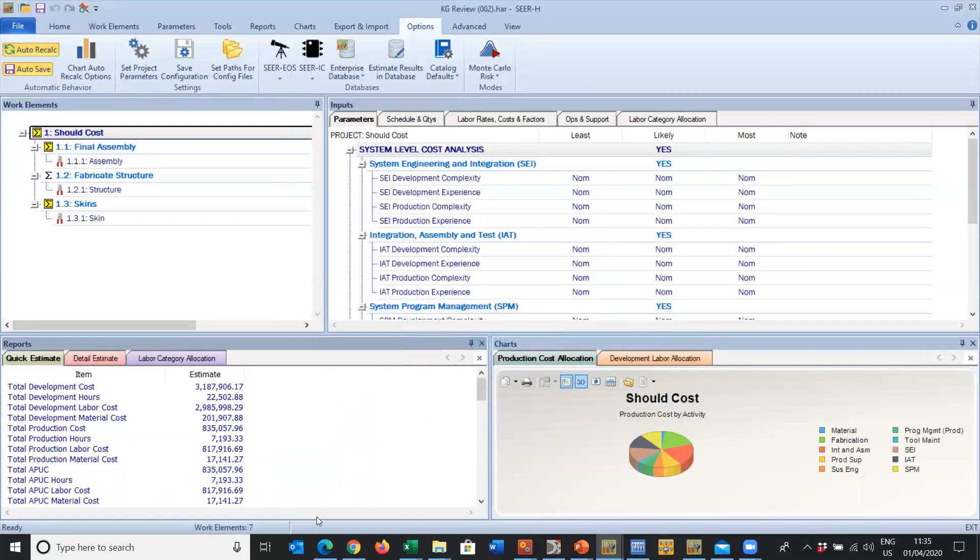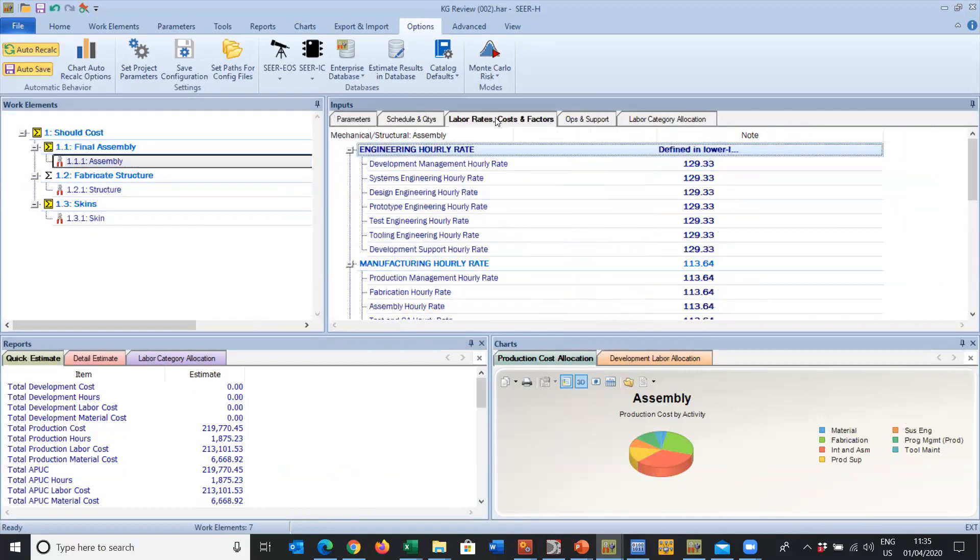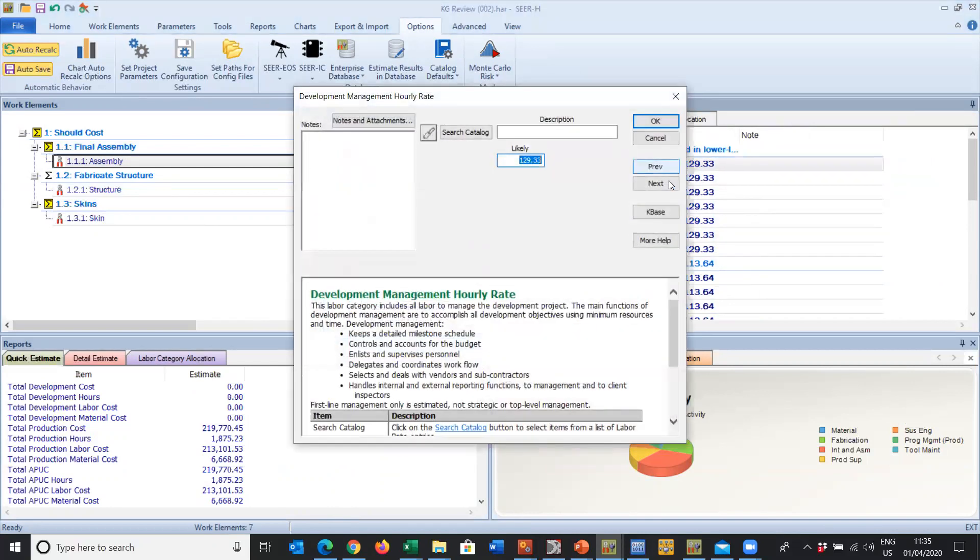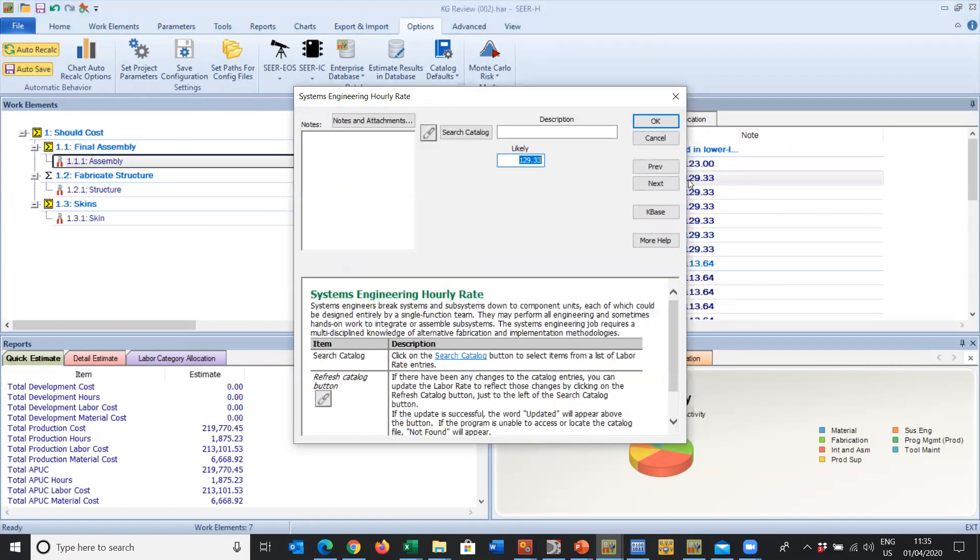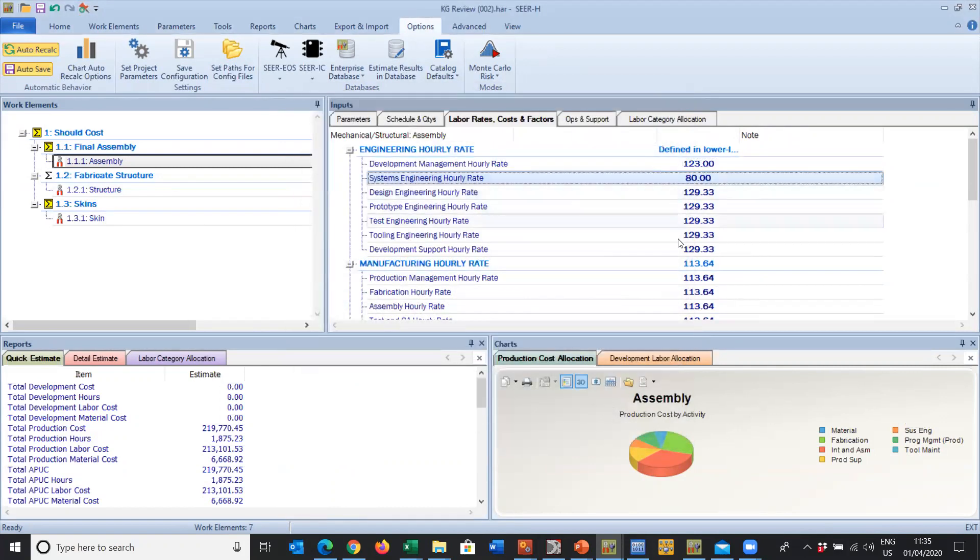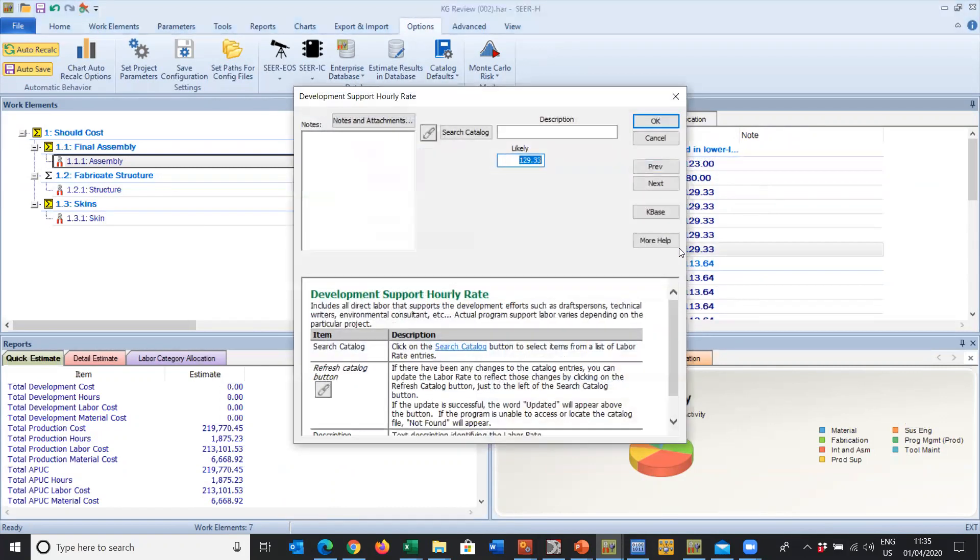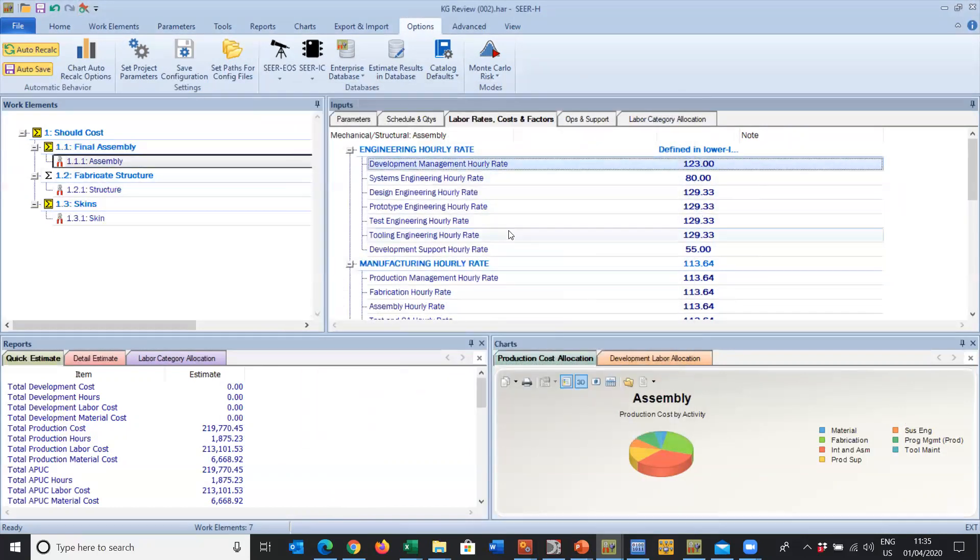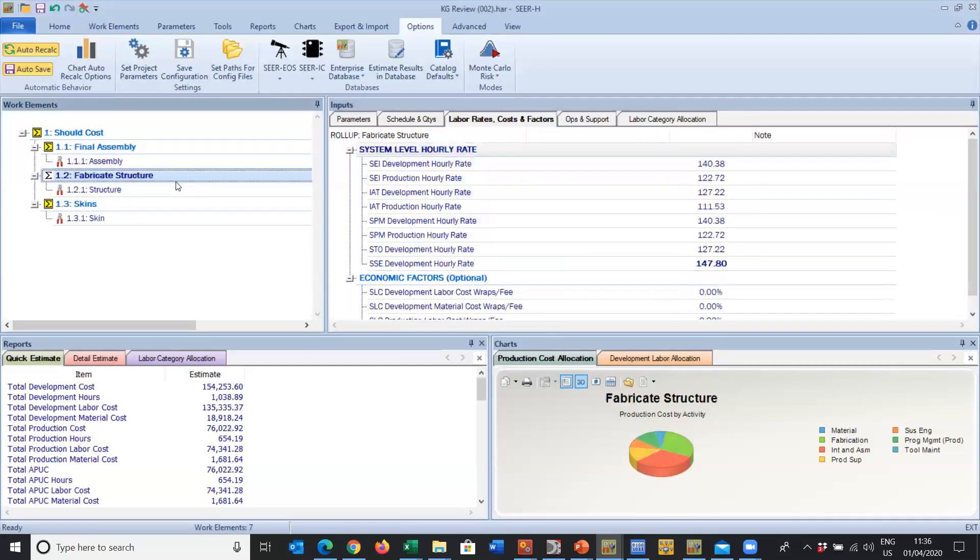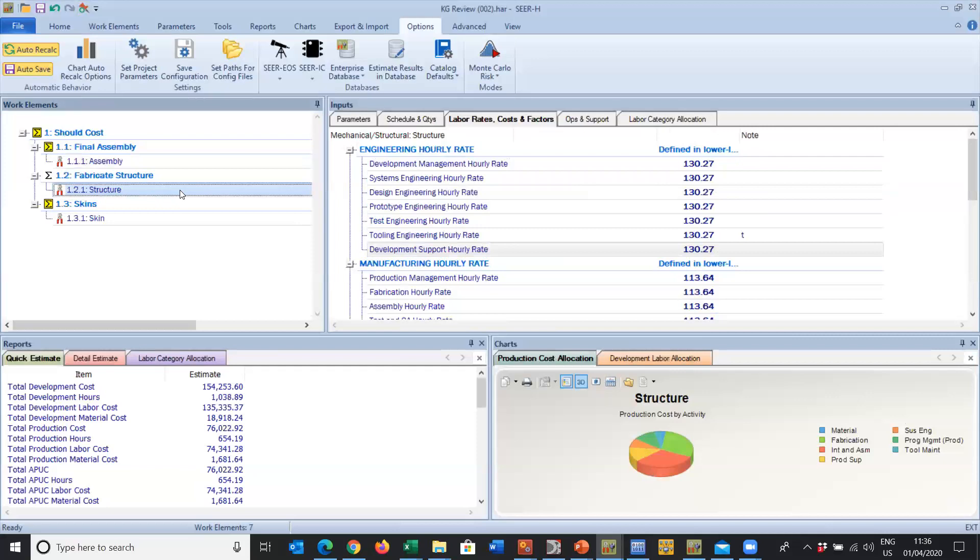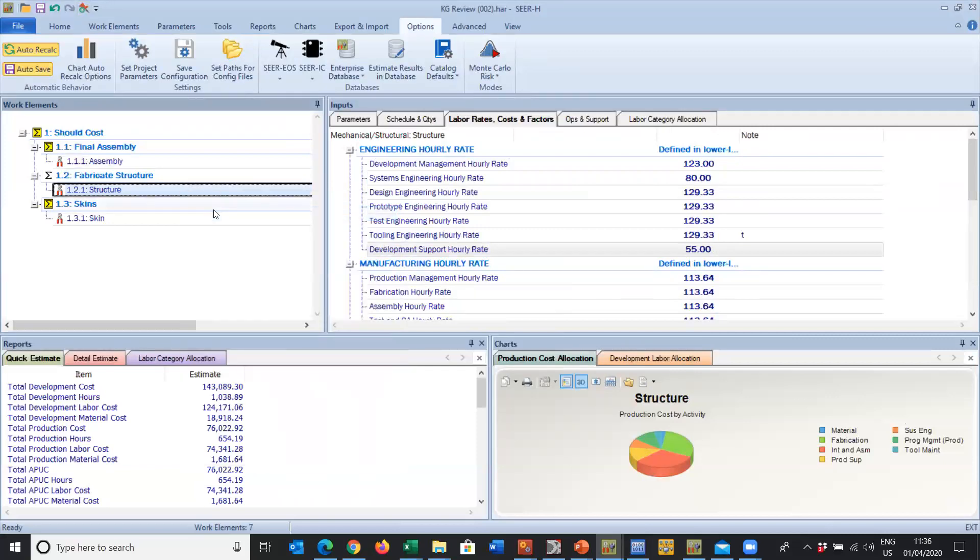We can use the reference to revert to reference or clear reference. When it comes to changing the labor rates, we come under the Labor Rates and Cost Factors tab and we can individually click on one of these and change that to my company specific labor rates for each of the individual classifications of work. We can do that one at a time, and then we can simply copy it and paste that into the next work element.